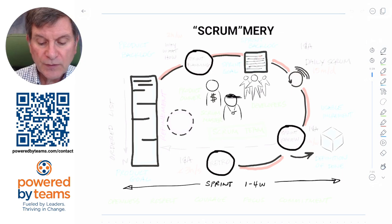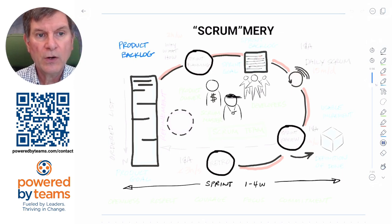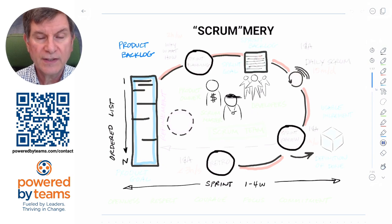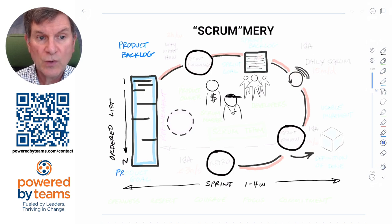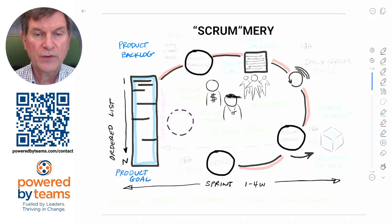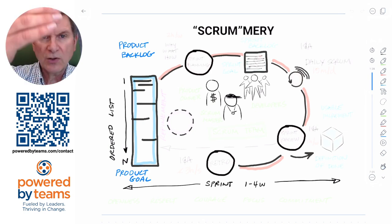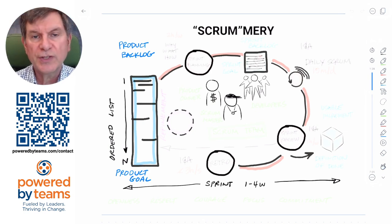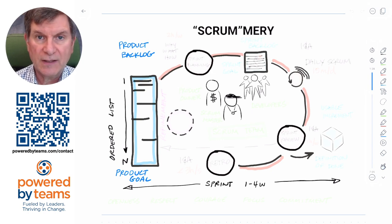Another good place to start with Scrum is with one of the artifacts — the product backlog — which is an ordered list of everything that you want to go into the product. It's the single source of truth from which the team is going to work, and it's centered around a product goal, which is the commitment for the product backlog. That product goal is a medium- to long-term tangible future state of the product that gives the team a target to plan against.